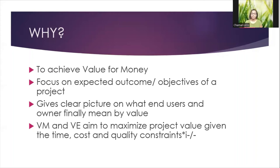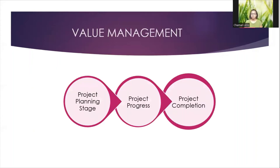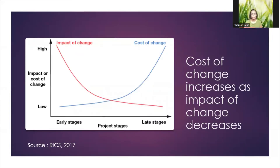Those three are the constraints in the triangle. Value management is not applied only at a single stage — you can apply it in the planning stage, during progress of the project, or at completion. However, we should know that the impact of change is significant if it is in the planning stage, because you don't incur additional physical costs. If the change is made at the initial planning stage, the design has not yet reached a physical level, so the cost impact may be less. At a later stage, the cost will be high, so it is advisable to apply value management at the very initial stage.